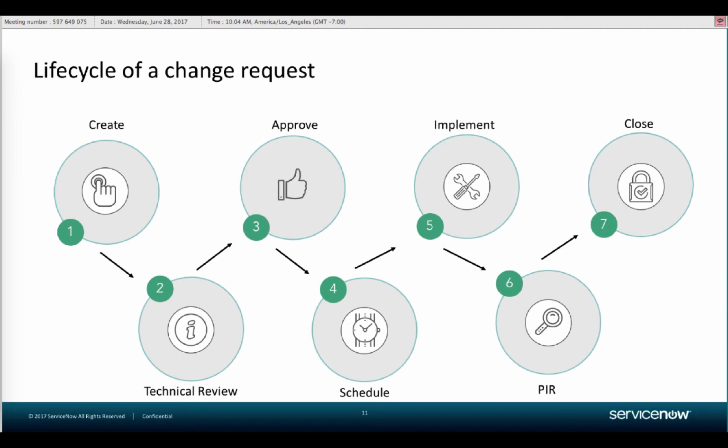That change, once populated, would be reviewed at multiple levels, but oftentimes the first level of approval is going to be a peer level review or a technical approval from the team that is going to be responsible for fulfilling that change. Once they have made an assessment of that particular change and determined that this change is ready for authorization, that may go to 1 or more additional teams to review and ultimately authorize the scheduling and implementation of that particular change.